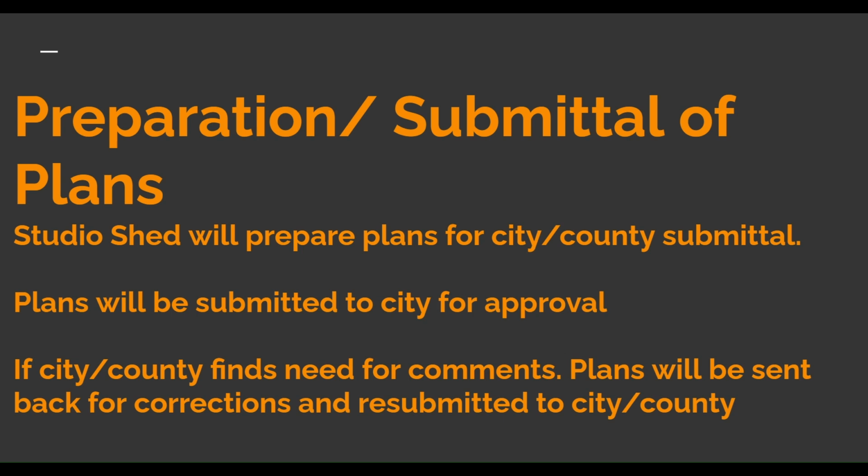Santa Rosa may ask for load calculations. So we're talking about electrical load calculations. That's what I mean. Electrical load calculations. We have a 50 amp sub panel on a 200 amp service. Everybody knows in the world that it's got enough load capacity, but I have to prove mathematically the load capacity.